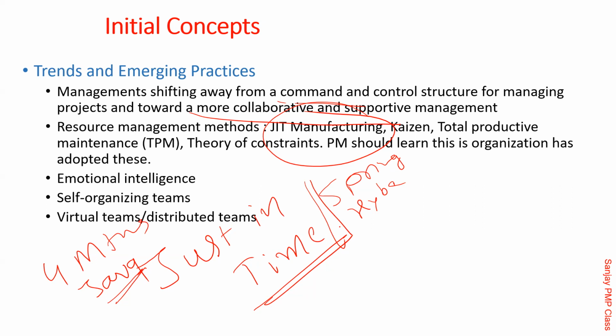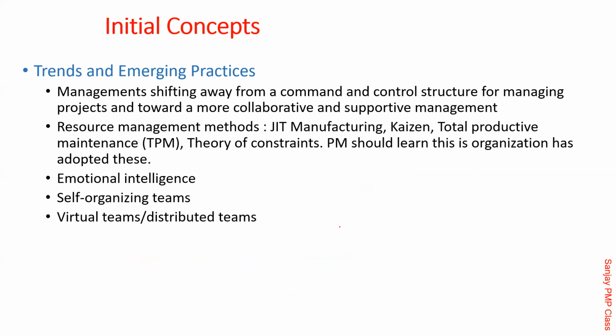Does it mean that you should always do just in time? I am not saying that. If it is a higher lead time, you will have to start ahead. But wherever possible, do it just in time is what they are trying to say.